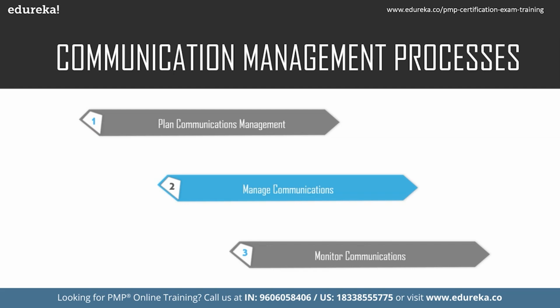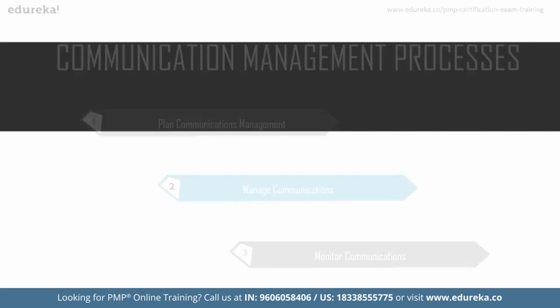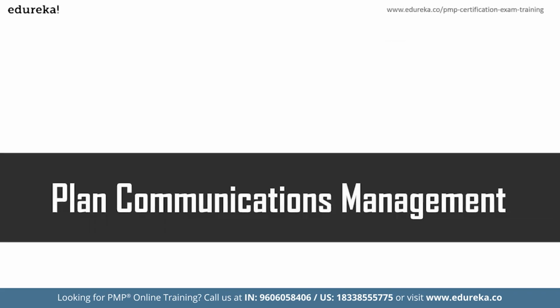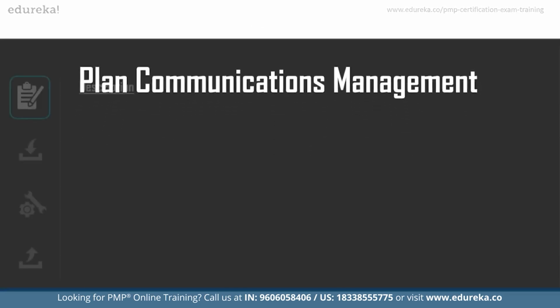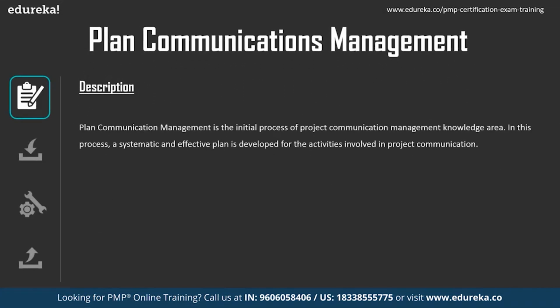So communication management is very important, and 90% of the time the project manager spends his or her time communicating throughout the project lifecycle. By this itself, one can understand how important communication is during the project. The first process in project communication management is plan communications management. The plan communications management process is the initial process of the project communication management knowledge area.